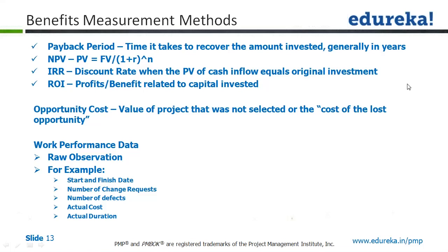And why we are talking about this is that once you are at the beginning of your project, the management must know when this project is going to give the yield, the payback. If the management has an option of choosing between projects, they would prefer a project with a better payout, an early payout, a project which is giving an ROI at a much faster pace. So it becomes an easy decision for the management once they know all four figures from here.